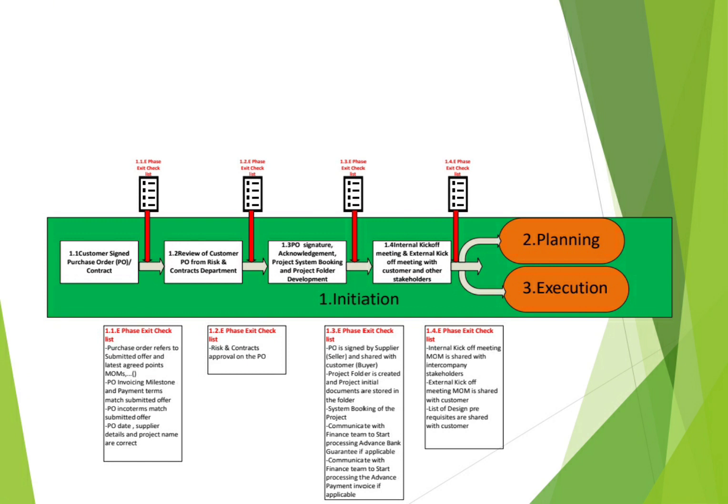Also, what is the template or the format of the advance bank guarantee? Maybe your customer needs a specific format, so you need to collect this also from your customer and share it with your